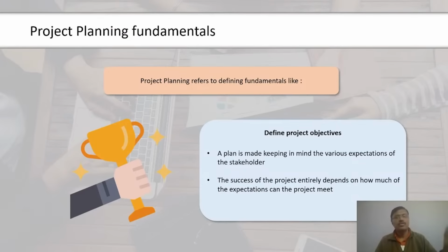Design of experiments can also be used for quality planning. This is a statistical way to determine what variables will improve quality. For example, in the case of manufacturing boards, it can be determined that increasing the quality of the wood can have maximum impact on improving the quality of the boards.